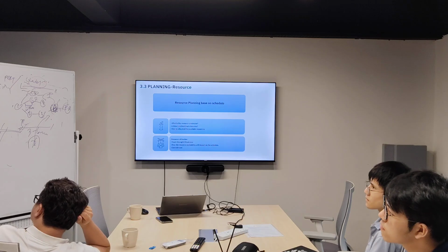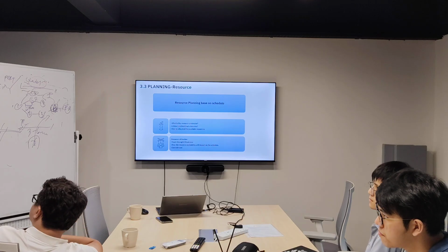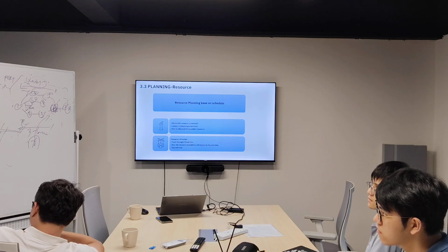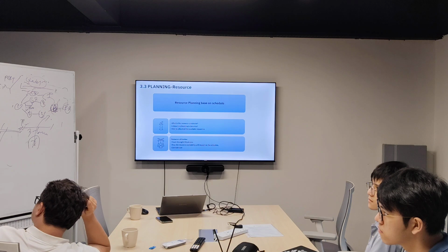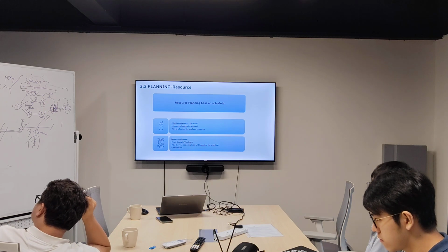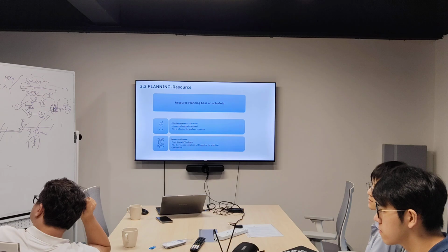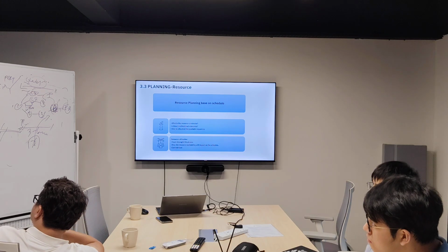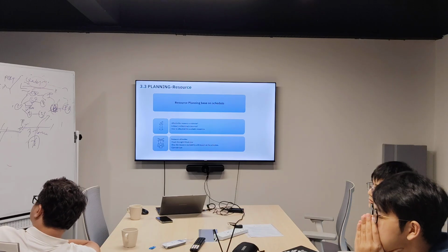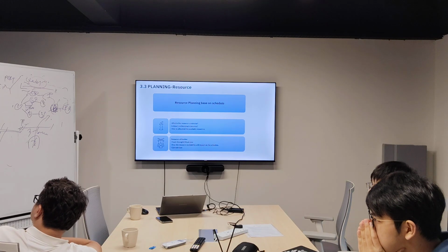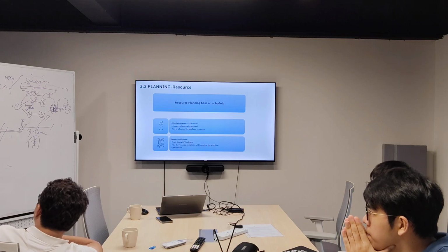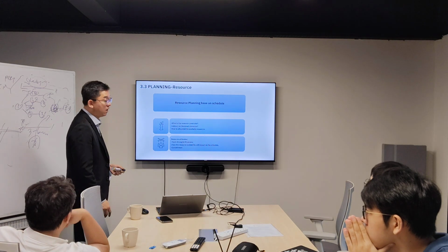So when you're planning for these resources, the total area that you can complete is constrained by that area and also the team members, and it can be completed within that 1 week. But if let's say you only have 2 teams, then you cannot complete the 100 square meters within 1 week, definitely 2 weeks. So if you want to cut short your duration, then you have to employ 4 teams. So when you do the scheduling, you need to consider this. Okay.